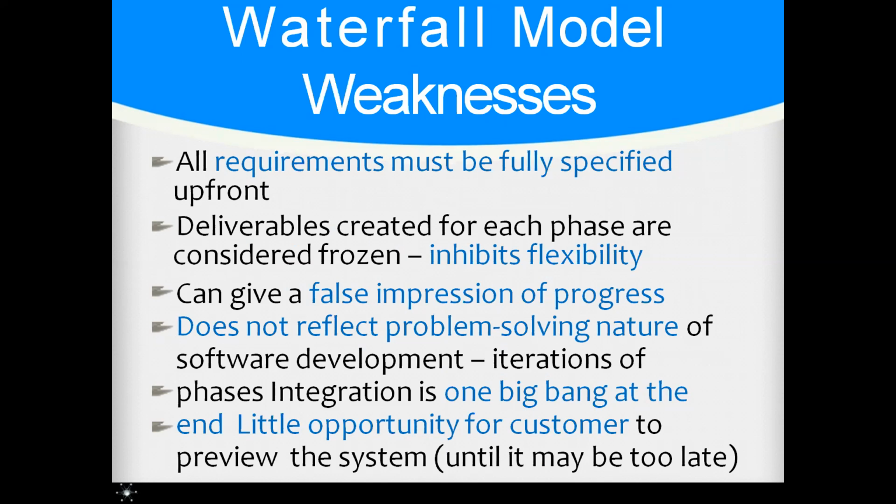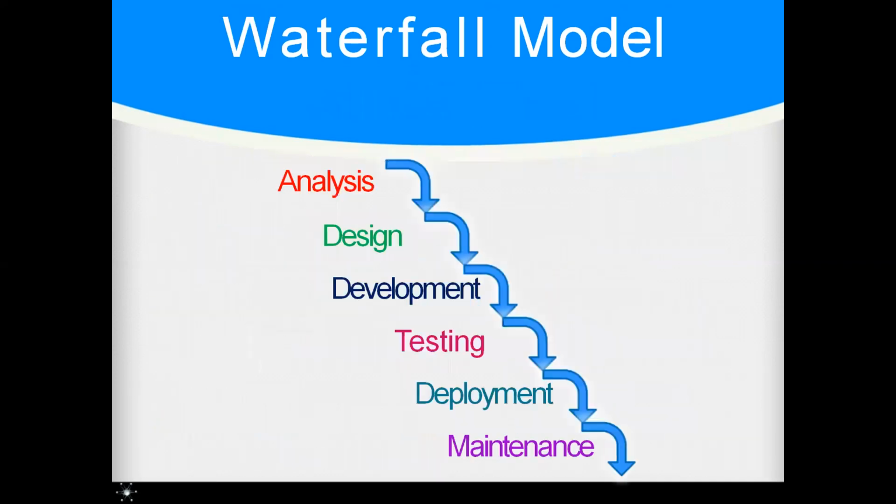Then I'll go to the last line. It gives little opportunity for customers to preview the system until it is made, until it may be too late. What this is trying to say is that the waterfall model does not give room, most times, to prototype. When you look at what you have here, it goes from development to testing to deployment. There's no prototype stage.